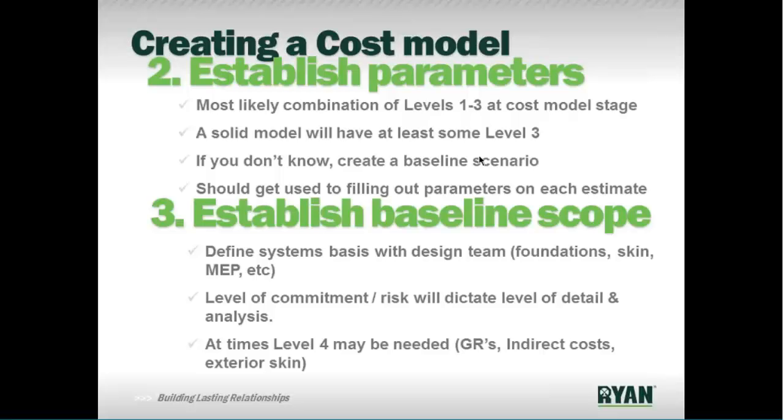The second point there in terms of establishing the baseline scope: the level of commitment or risk that you're taking on when you present this pricing should dictate the level of detail in the analysis. So for instance, if you have a day and a client's asking for a hard number, you should be pretty careful about what the scope is and defining that scope in that detail and creating the right qualifications for presenting that information. So it totally depends on the context of how it's being brought to you, and you'll want to take on a different level of information, detail, and analysis based on what your level of commitment is with the deliverable that you're creating.